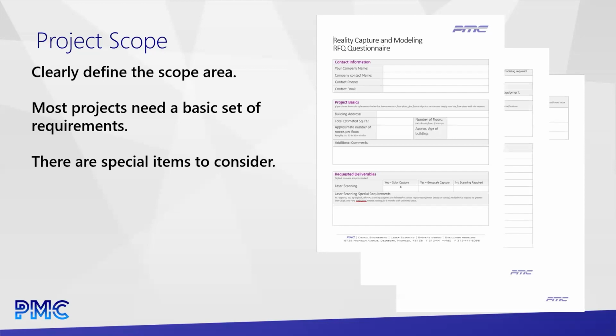Ideally, what we'd love to have is some kind of rough layout, a marked up PDF that says, okay, this is a scope area. And we understand, if you had perfect PDFs, you wouldn't be talking to us. So we understand that whatever you have might not be accurate enough, but it's good enough for us to put a bid together for you and estimate it.